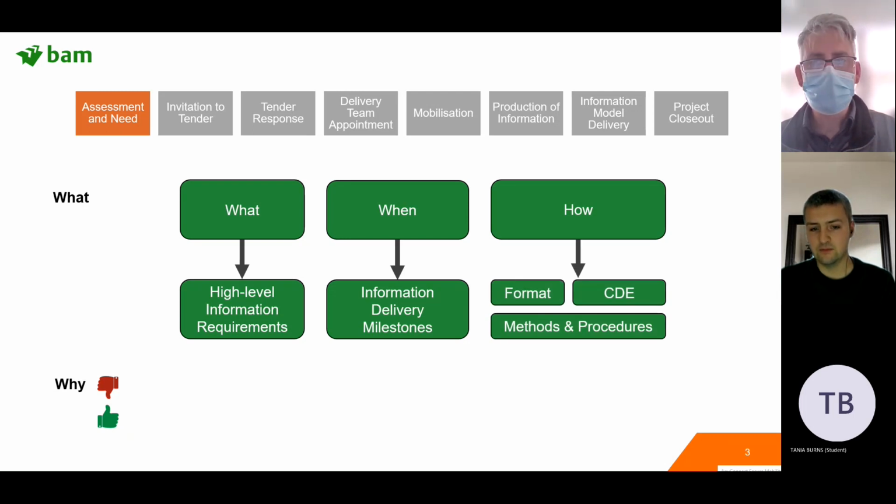And this is what wasn't really done in the past. But ISO 19650 requires clients to actually think about how information is to be produced, exchanged, reviewed, delivered, and so on a project. The reason that responsibility has been pushed onto the client is that they're there at the beginning. A lot of other companies, including us, BAM, are often not appointed until quite far down the road. And if you haven't had collaborative working practices set up right at the beginning, you're going to have problems